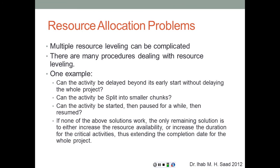When managing multiple resources simultaneously — labor, equipment, materials, subcontractors — the process becomes more complex. Strategies for reducing peaks include: delaying a non-critical activity along its total float; splitting the activity into smaller chunks; pausing and resuming the activity to avoid a peak. If none of these work for non-critical activities, the same strategies are applied to critical activities, knowing this will extend the project duration.